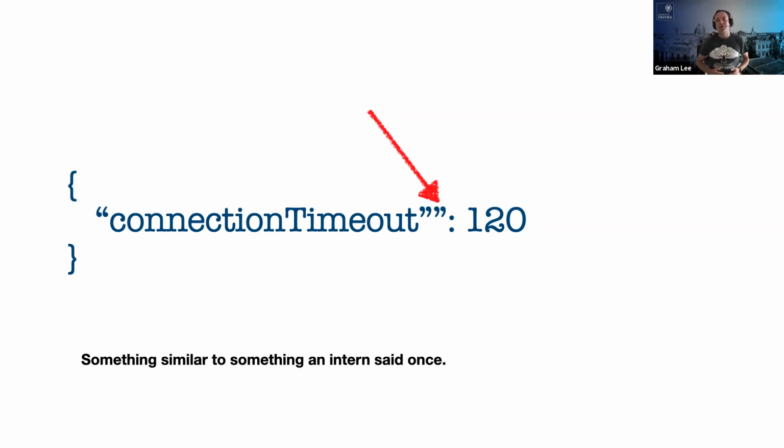So did we fire the intern? No, of course not. They made an honest mistake. What we did was have an after-incident review where we said what happened and what was the chain of events, what are the properties of the Facebook system that allow this very small problem, a one character typo in a text file, to turn into a 9-hour-long production outage. And now what do we do in order to make the system resilient against that? What do we do to improve?